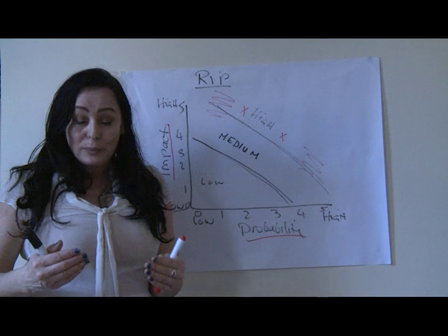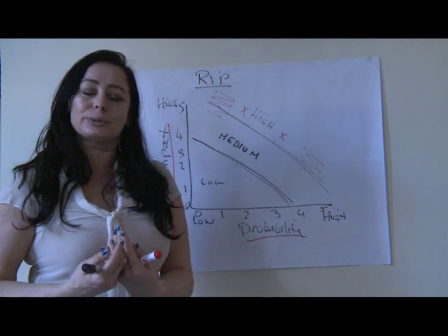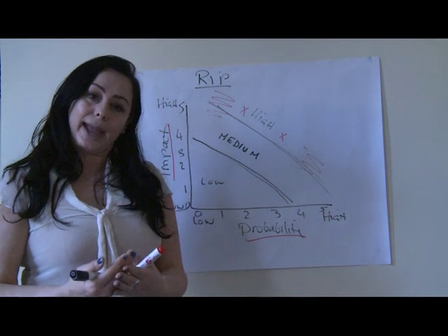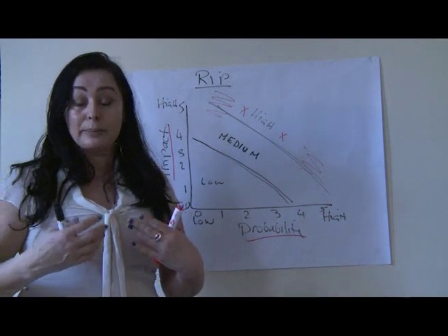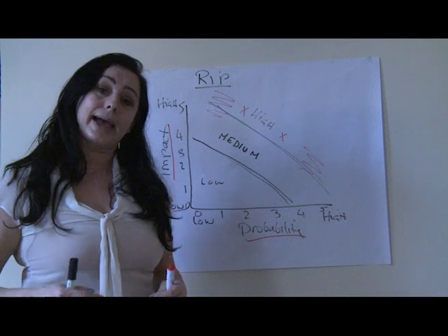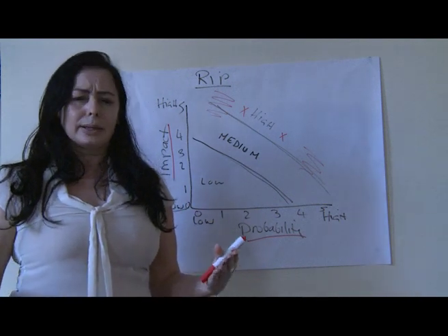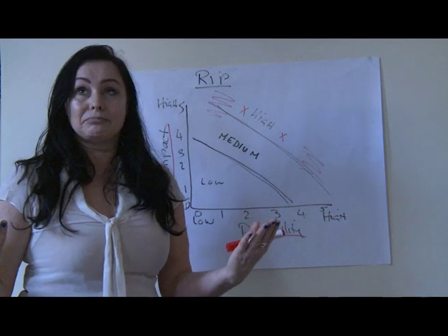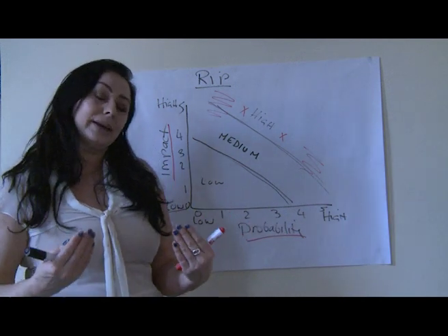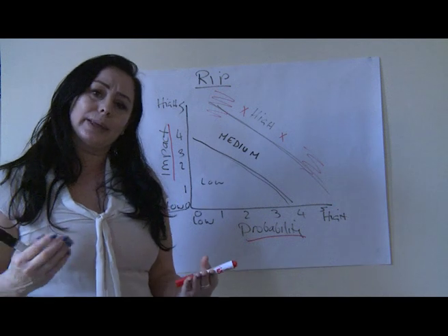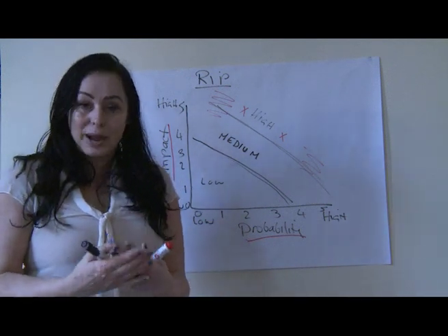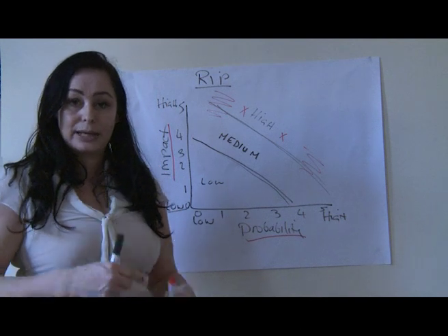So when we start to formulate a risk register, there are a few questions we need to ask. And the main one is, what if? What if something happens? So imagine you're filming a marketing campaign the following day and you're filming it outside. Let's think about some of the what ifs that you might want to ask yourself. So what if it's raining? What if it's snowing? So the weather is a key factor in filming outdoors. So what would you do? What contingency plan would you have in place if it was raining and snowing?